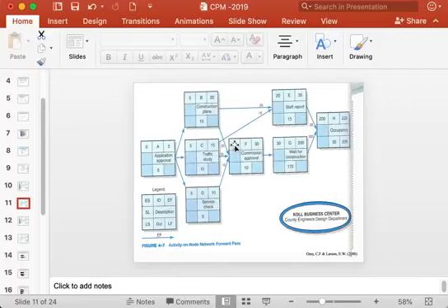After having waited for 20 days, F can start, and then it will take 10 more days. So 20 plus 10, 30 days. After 30 days, at the earliest, EF here, earliest finish, F will finish.